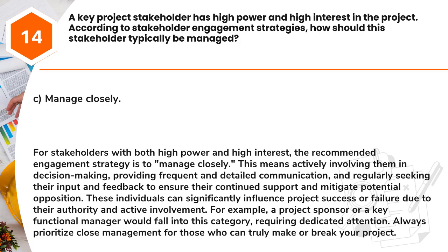Answer: C. Manage closely. For stakeholders with both high power and high interest, the recommended engagement strategy is to manage closely. This means actively involving them in decision-making, providing frequent and detailed communication, and regularly seeking their input and feedback to ensure their continued support and mitigate potential opposition.